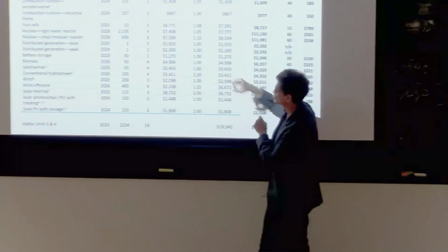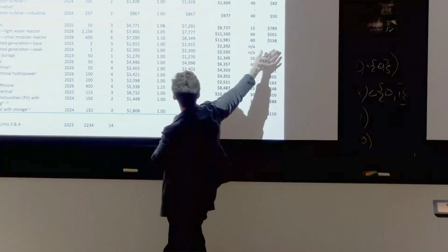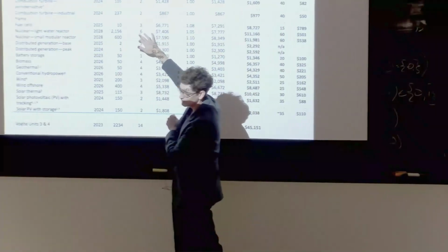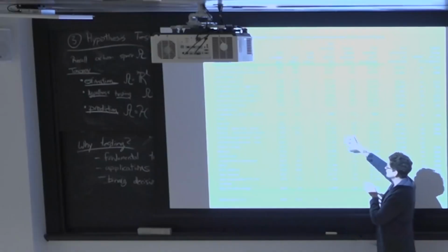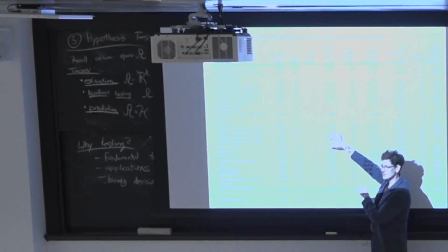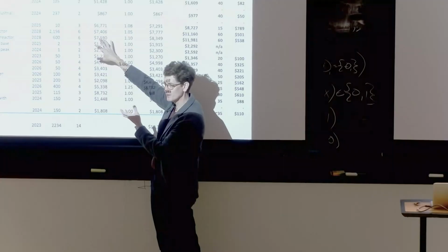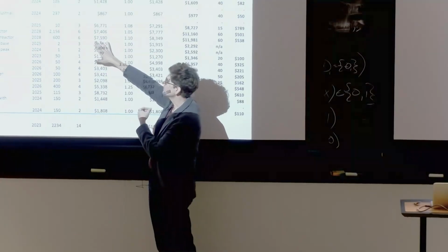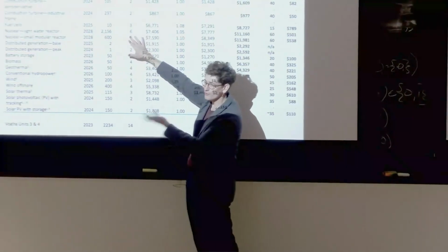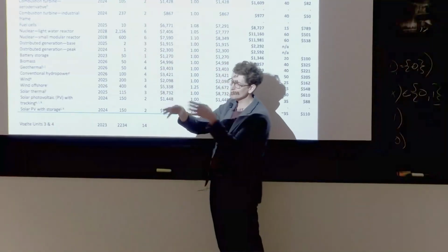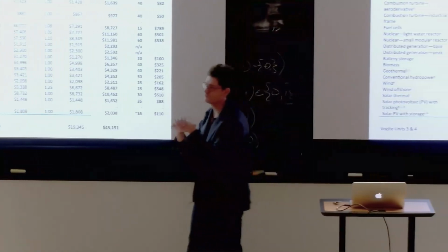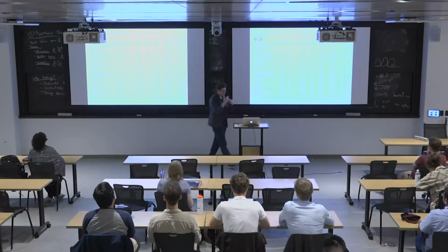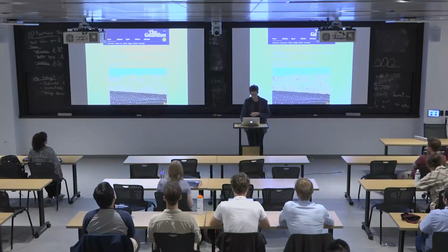And it assumes also that if you're looking at this number, it assumes that it gets built in 6 years, which hasn't been done in a while. So part of it is that this number is high because of safety considerations, because of delays, just so many things that make it more complex. Part of it is that this number sometimes gets inflated and also drives up the cost. So it's coming from multiple places, right? And you've got to deal with all of them if you want to figure out a way to make it cheaper. And that's kind of the story I'm trying to read for you.